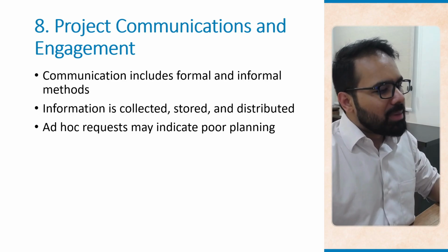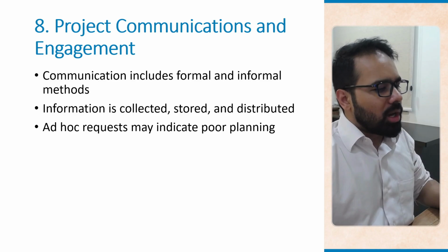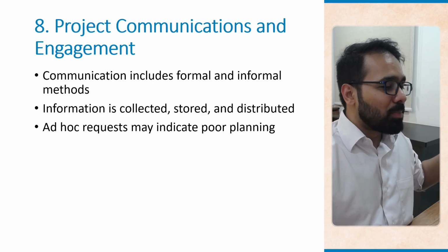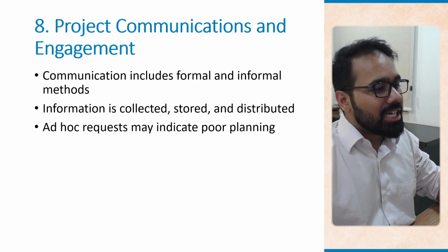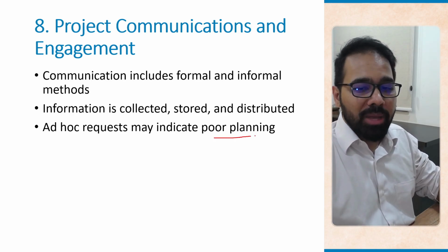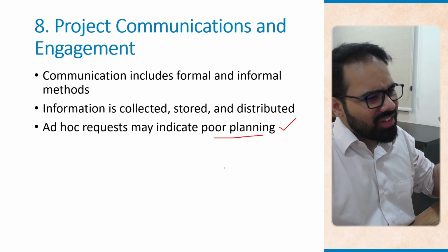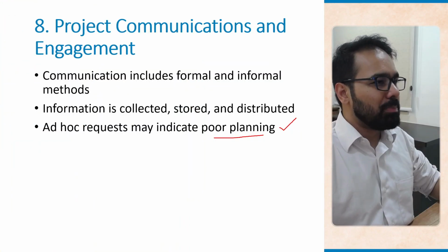Ad hoc requests may indicate poor planning. If stakeholders constantly ask for updates, and if stakeholders ask for updates that you have already communicated, and these are all outside your planned reports or maybe even inside your planned reports, the communication plan then needs adjustment for sure, because you may or may not be sending out the proper communication to begin with. And secondly, even if you're sending out proper communication, it is being sent in a way, maybe through email or maybe through meetings that nobody attends, that people are not getting that communication piece from you.